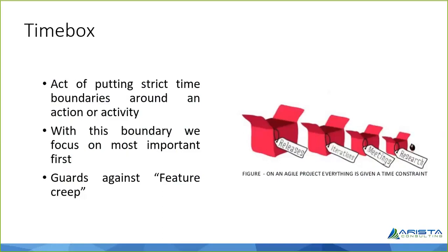Okay? So with this boundary, we focus on the most important first. So now when you have faced the issue, you can't say that I'll leave the issue for the 6th item because I have to complete 10 items, so I will run behind other 3. If that issue is important, you will chase that issue. If the 6th item is not so important, then you can leave that issue aside and pursue the balanced 3 items. So that is very important.